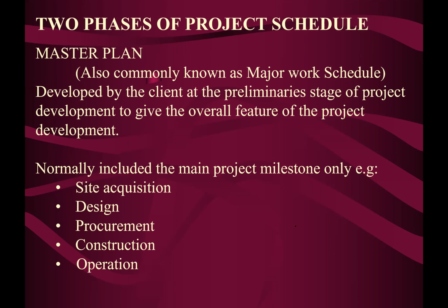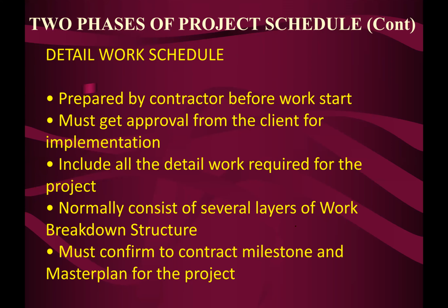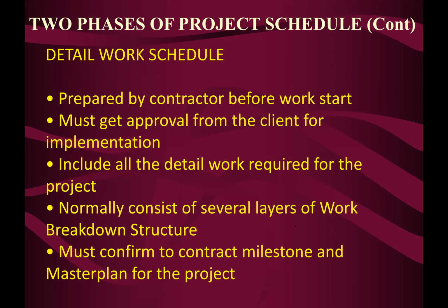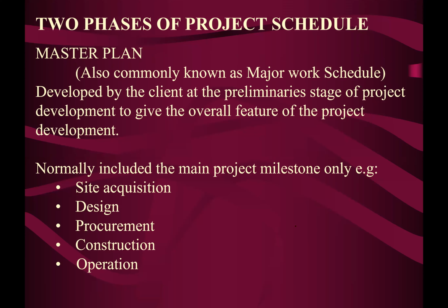Two phases of project schedule: master plan, and then the second one is detailed work schedule. Fortunately, if we use software nowadays, we can integrate both master plan and work schedule in one work program, because it is just a matter of whether you want to see the detail or not. You just simply click close or hide certain button so that the detail will not be shown.